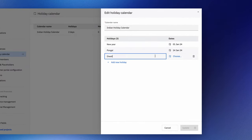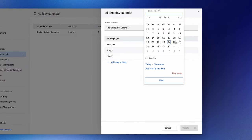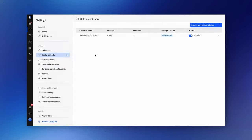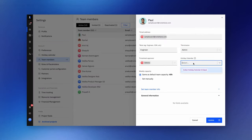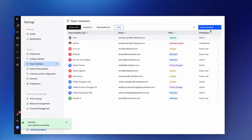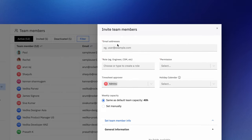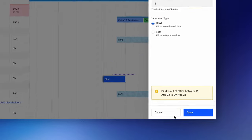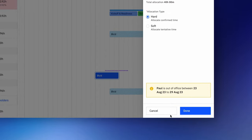You now have the power to set up predefined holidays aligned with your team members. So even if your team operates across various regions with different holiday schedules, Rocketlane supports multiple holiday calendars. This means you can assign the appropriate holiday calendar to each team member. The impact here is comprehensive — from timesheets and task assignments to resource plans and communication, including project creation and team allocation, you'll always be informed if a team member is on holiday during a specific period.